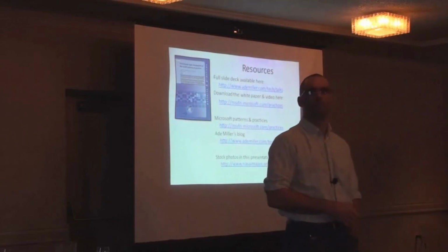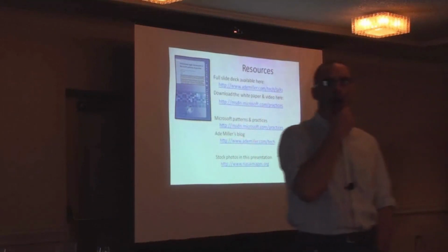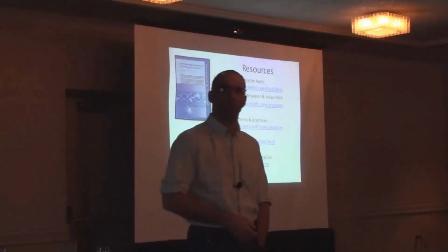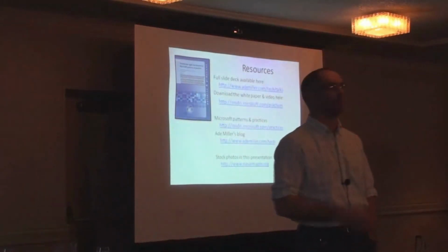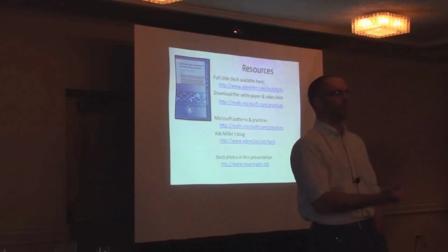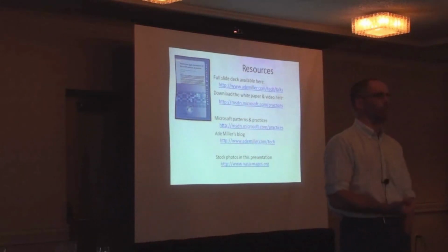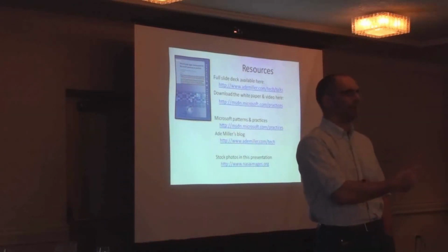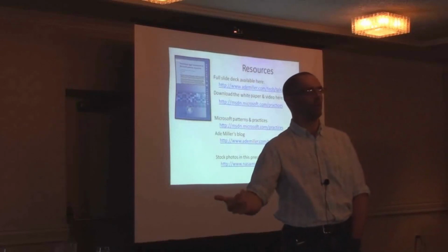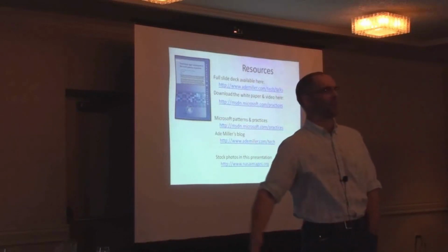I'll have one. Follow the sun. We sort of try and do that. Have you attempted it at all? No, I know of other teams at Microsoft who have, and they've had reasonable success with it. For those of you who don't know, follow the sun is this idea that you literally have, the canonical example is, a development team on the west coast of the US, another one in, say, the UK, and a third one in Singapore. They're roughly 8 hours time difference.